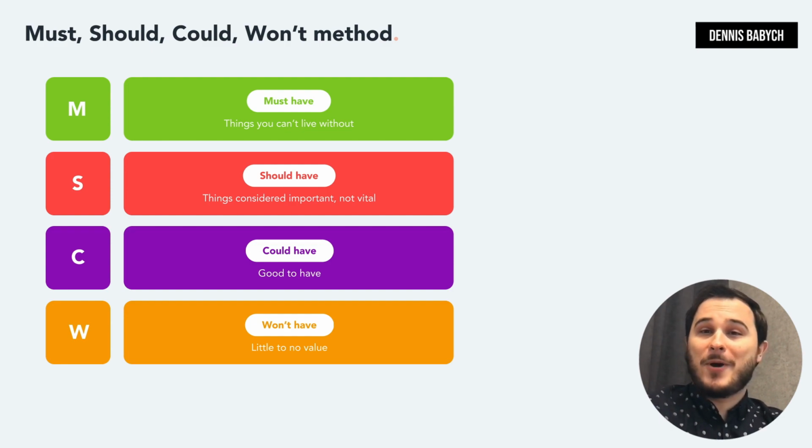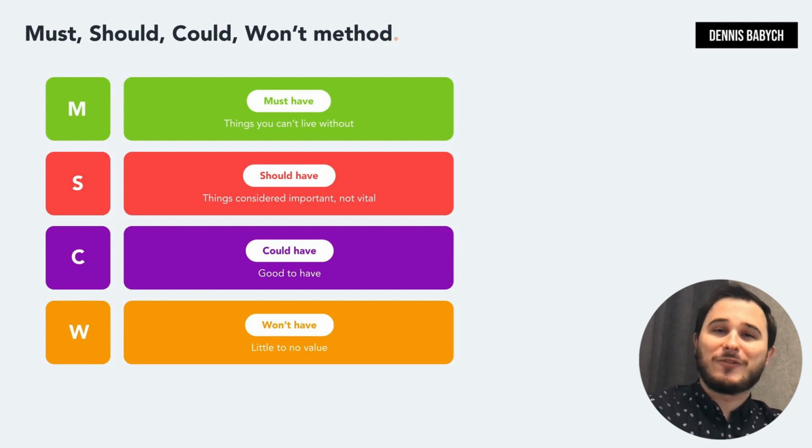Okay, once you've done a deep dive into your competitors, pinpointed all your customer issues, and come up with a bunch of solutions, it's the perfect time to properly prioritize your software features. You'll have to figure out which features are must-have, should-have, could-have, and won't be developed. This savvy approach not only gives you a solid game plan for the essential features your app needs without busting the budget, but it also lets you pivot as necessary without burning through all your resources.